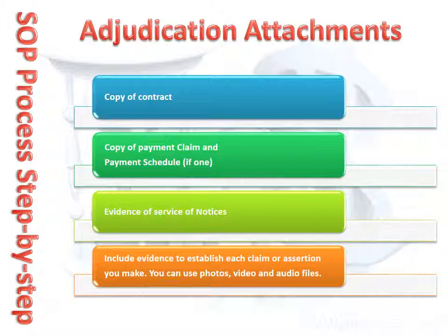Attachments do not have to be just documents. Whilst generally they will be, you can attach photos, video and audio recordings. Again, do not rely upon the attachment explaining itself. Make sure you spell out in clear and concise terms why you have included the attachment and what it proves and why it proves it. Do not take for granted that the adjudicator will understand why an attachment is there.